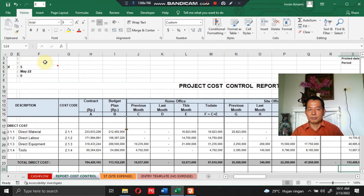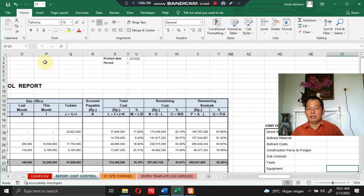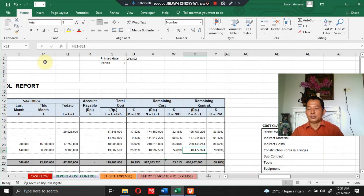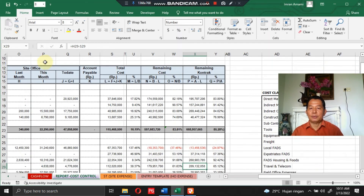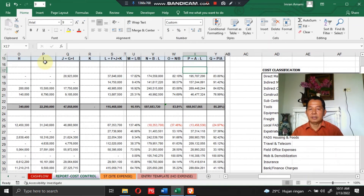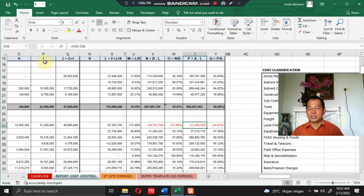Furthermore, you will easily find out if there are remaining costs that are minus or exceeding the contract or plans — those numbers will appear in red color. You could see here it's showing in red color. This means you have to immediately discuss these cases with your project management team to find out the cause by tracking the expense section and find a solution.